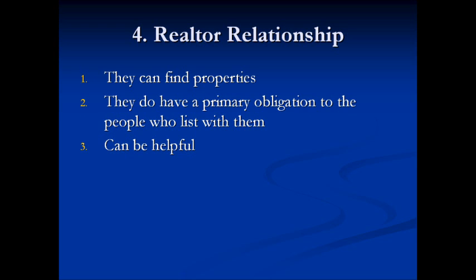Most realtors have a primary obligation to the lister, the one who lists, and so you would want to make sure that you form a relationship with a realtor where they are the buyer's agent as opposed to the seller's agent. That puts them in your corner as far as interaction is concerned. And this relationship with a realtor can be really helpful.